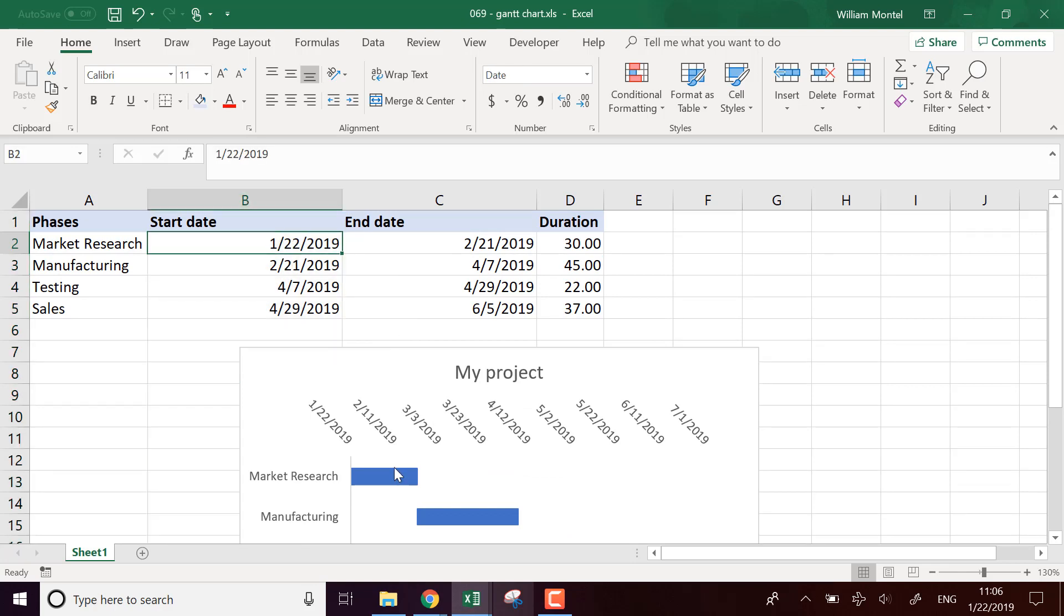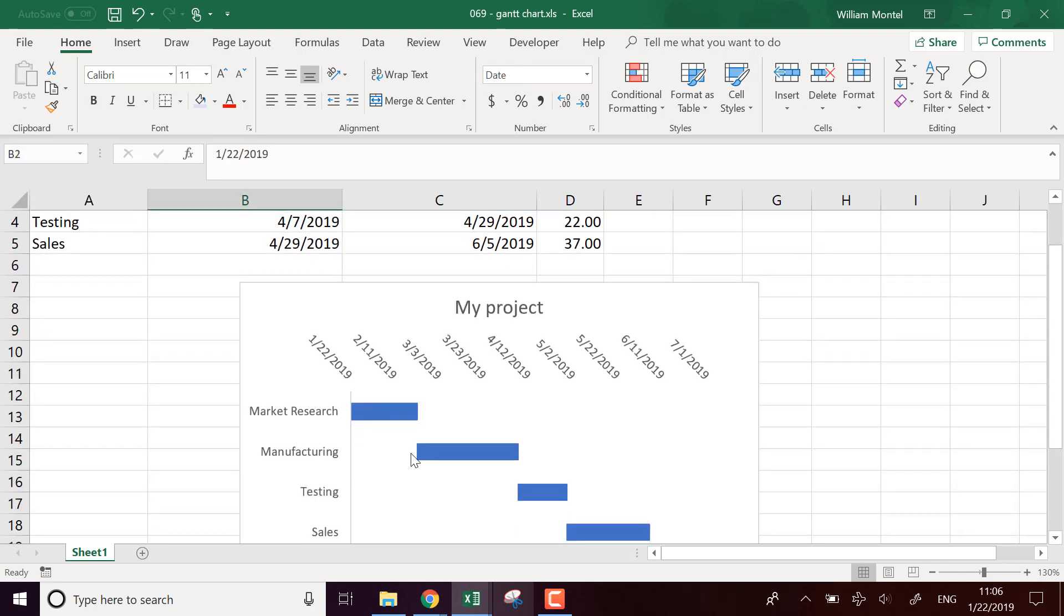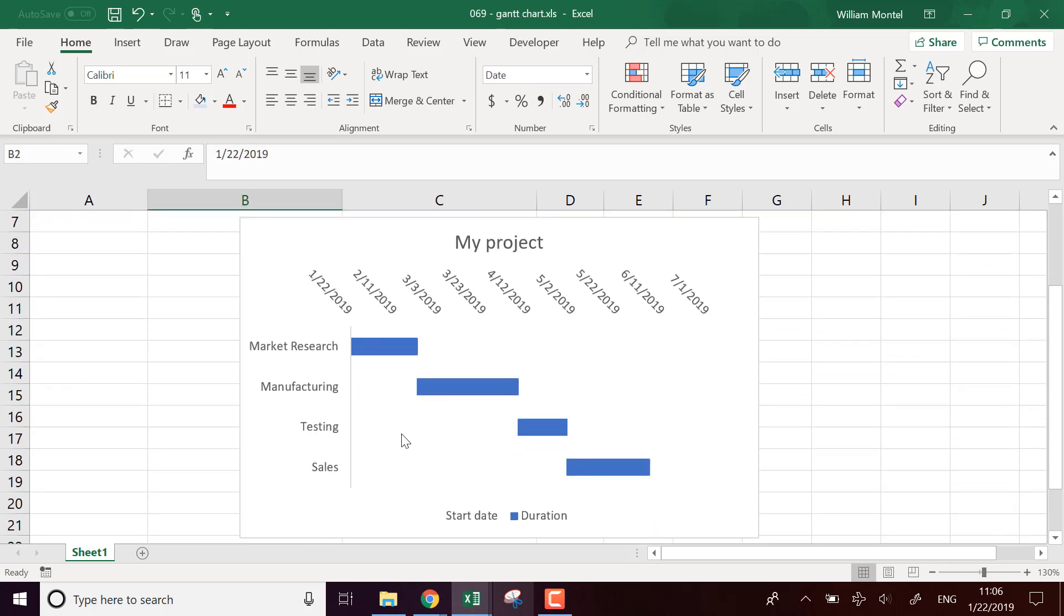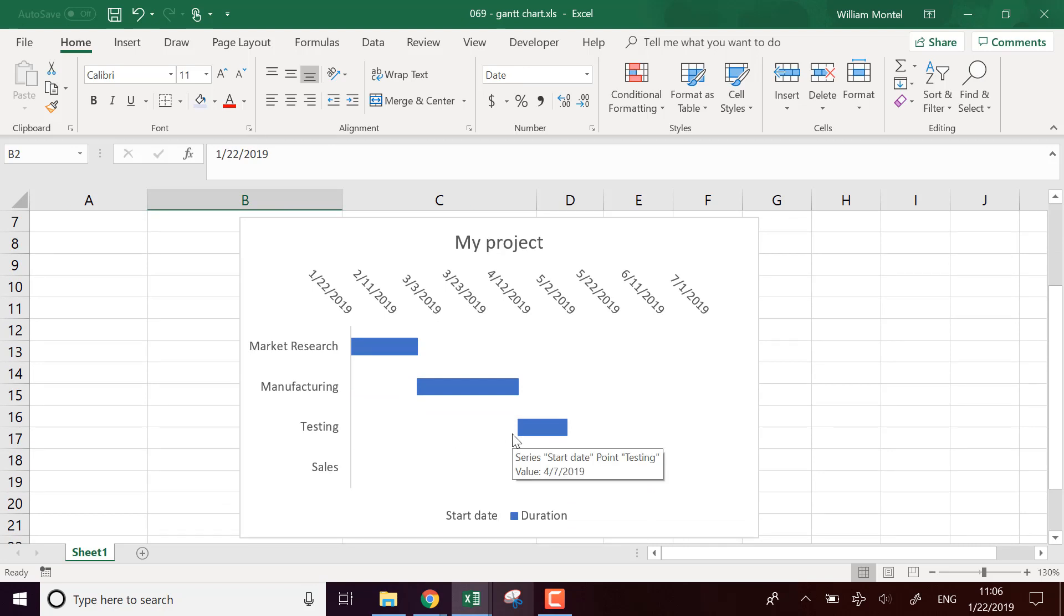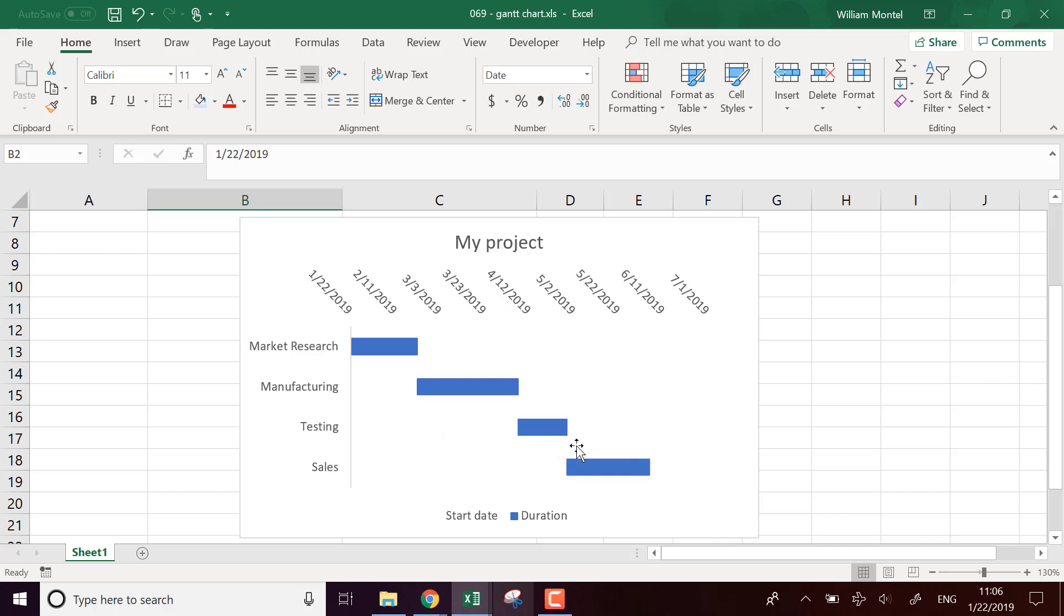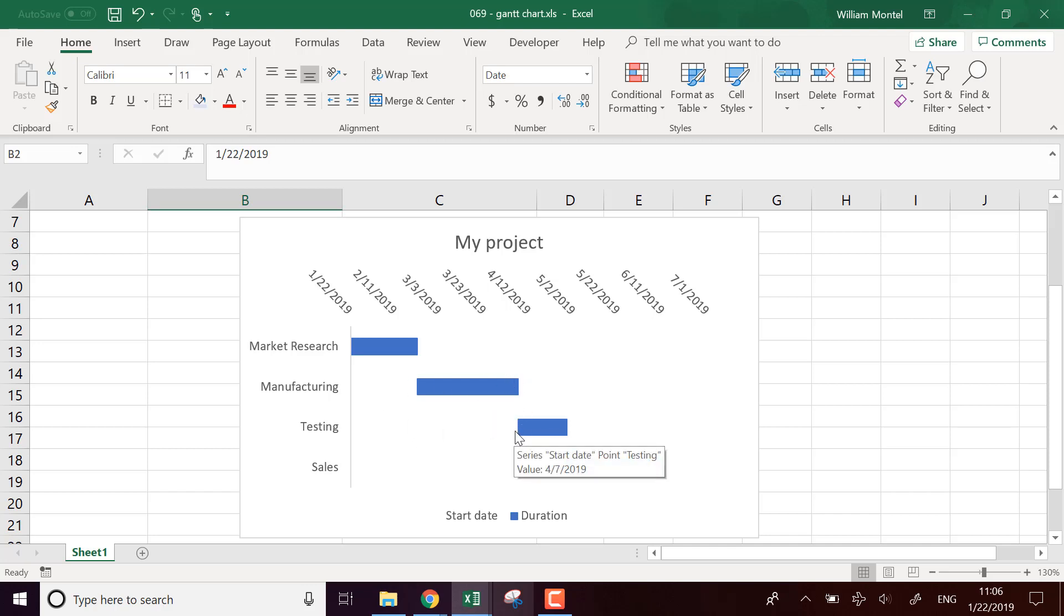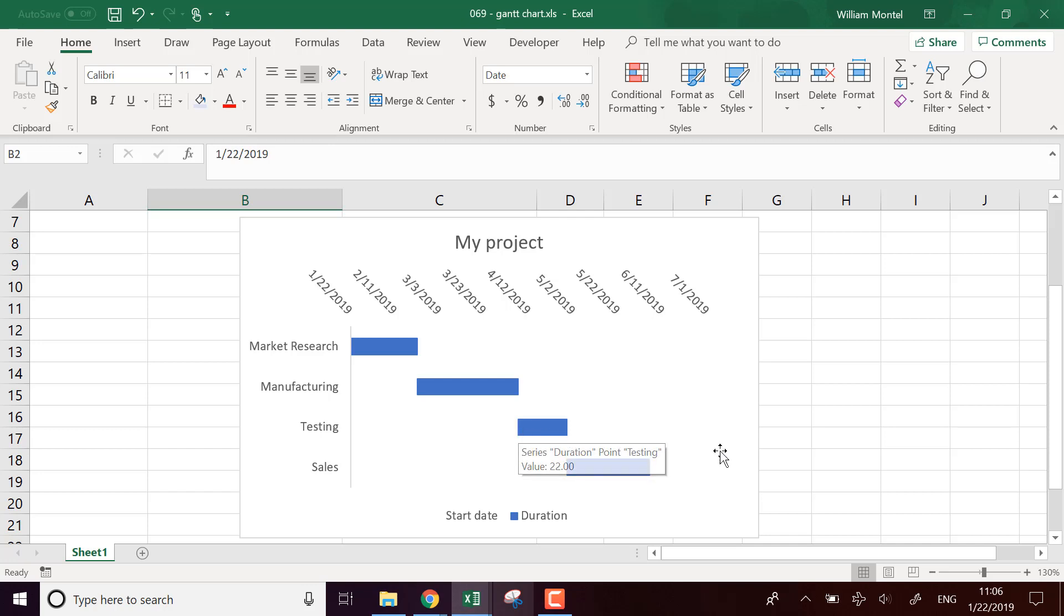You display the start date in white so that each time you don't see the start date on the chart, you just see white and then you have just the duration and the duration is displayed at the start date in color.